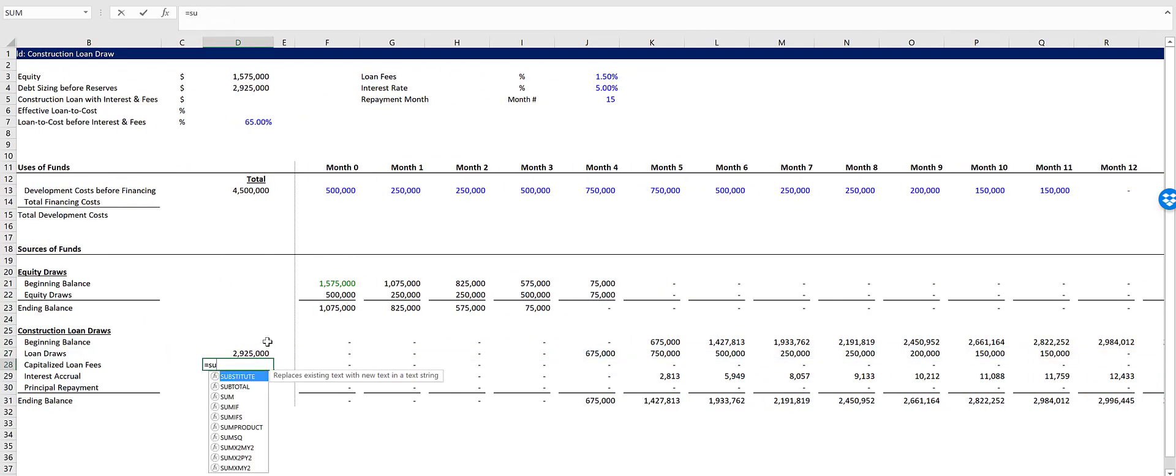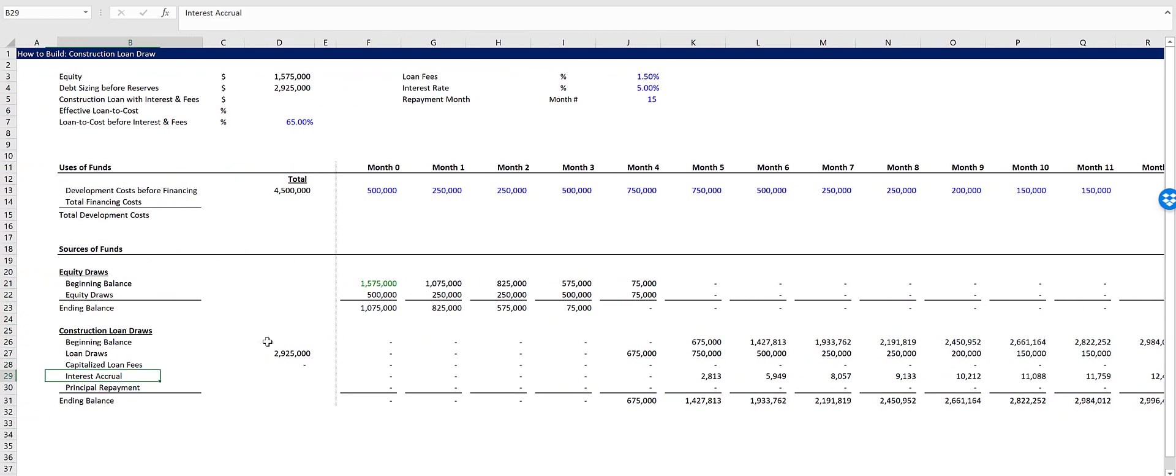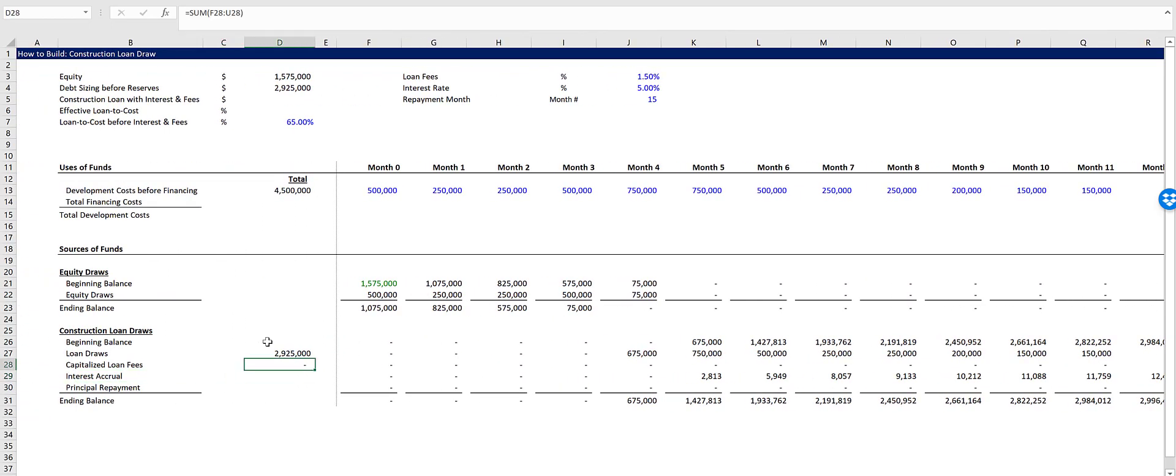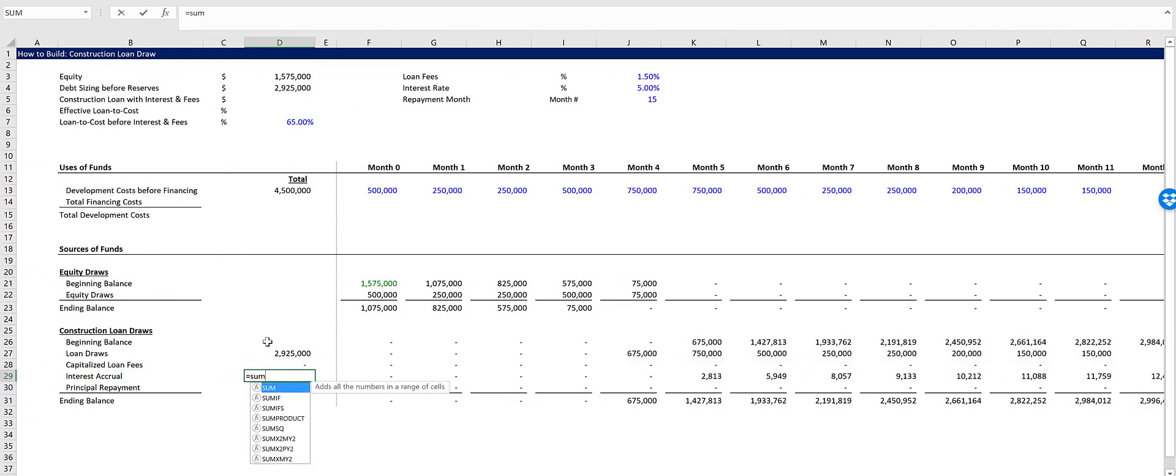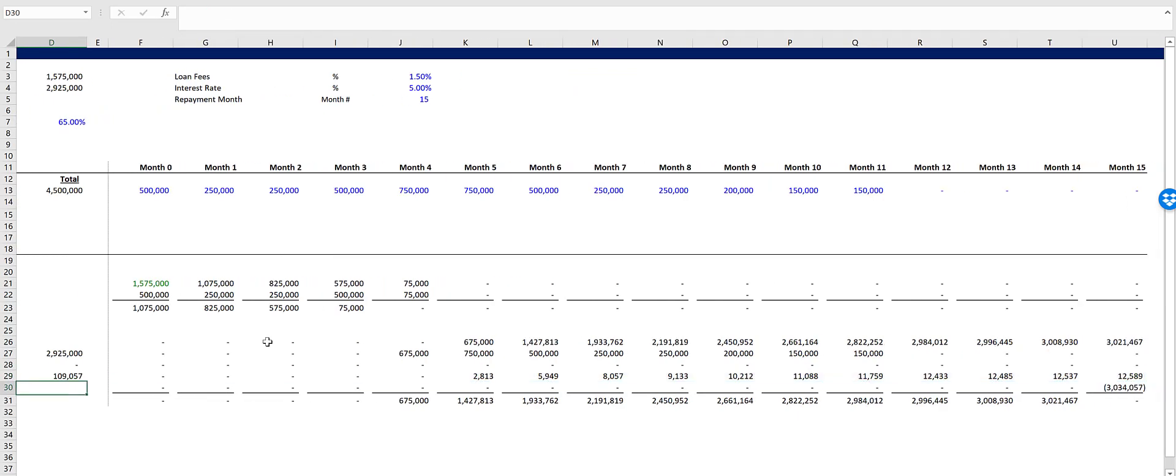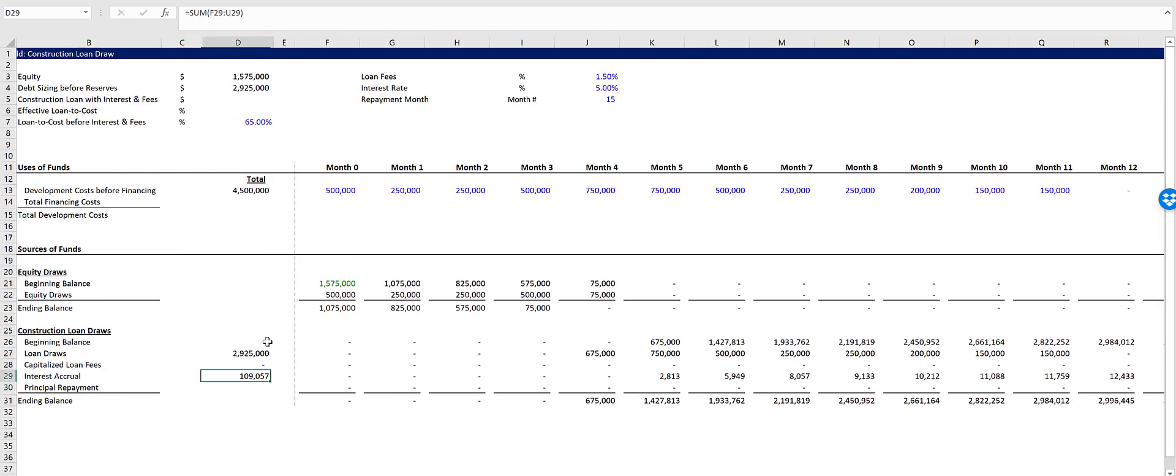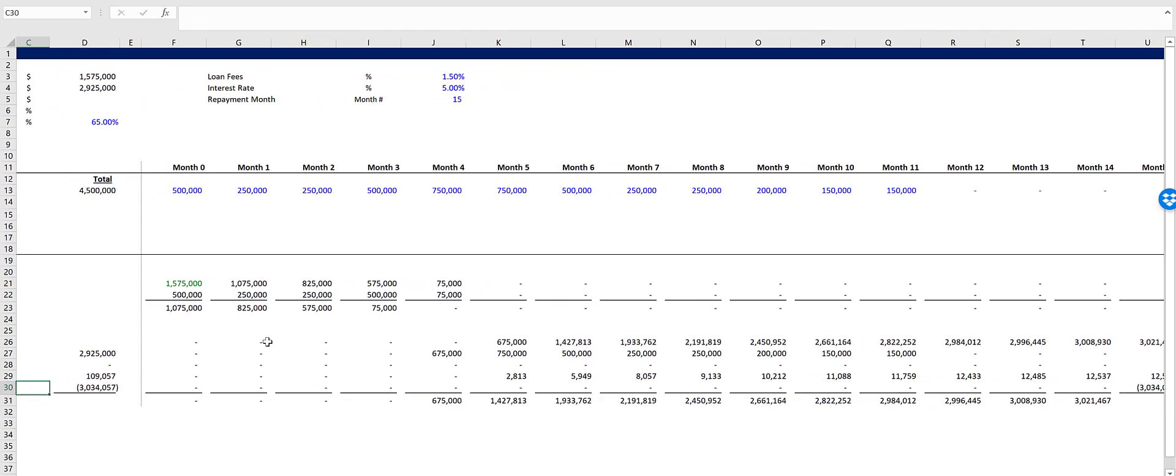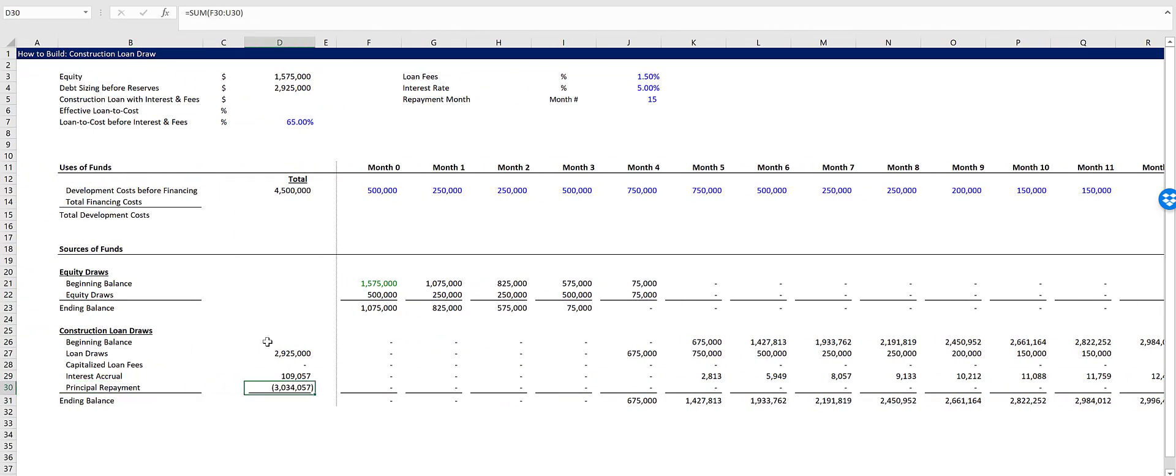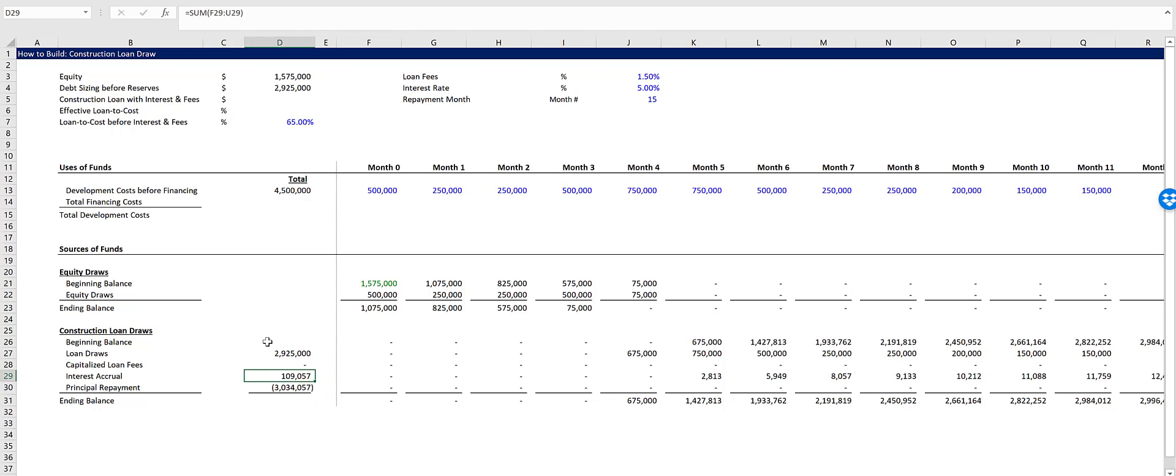Then we have capitalized loan fees, zero for right now, and our interest accrual $109,000. And then our principal repayments equals zero. So this is the issue. We don't have any money to pay the interest accrual while we're constructing the building. So the bank's going to fund a portion of this, but then how do they size the loan? Well, that's why we need a circular reference.